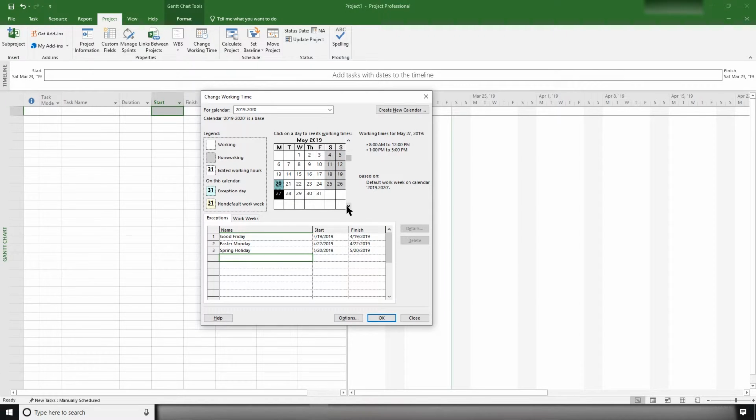So the next one we will do, how about August? We'll do an August summer holiday. Click under Starts and it will just take the days that you had highlighted in the calendar here. Then should we just do Christmas? So we'll make sure Christmas Day is a holiday, and the 26th we'll have Boxing Day.